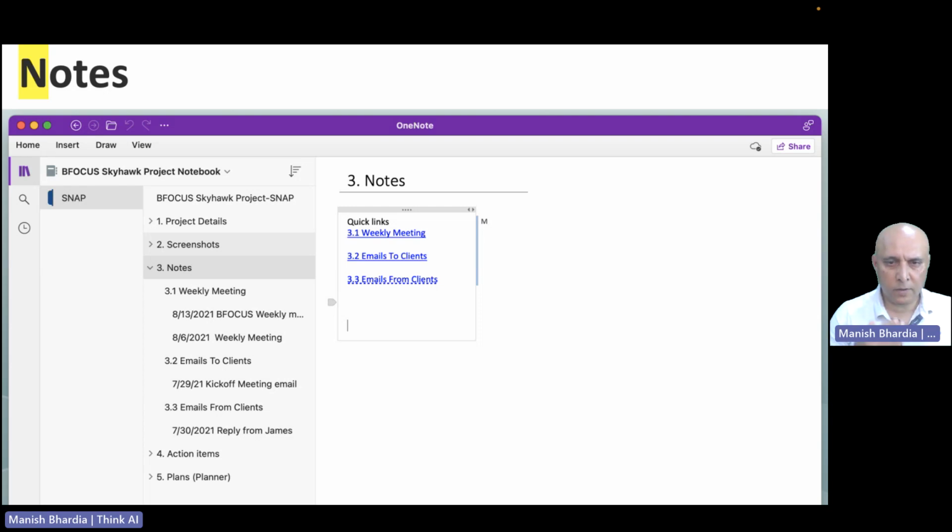In either way, as long as we know what is in the SOW or what was discussed in the meeting notes, we can always go back and say, hey, we could not point this out, but because we discussed this, we need to revisit it. But if it was never written, then we can never talk to the client about revisiting. So that's the thing we want to do.